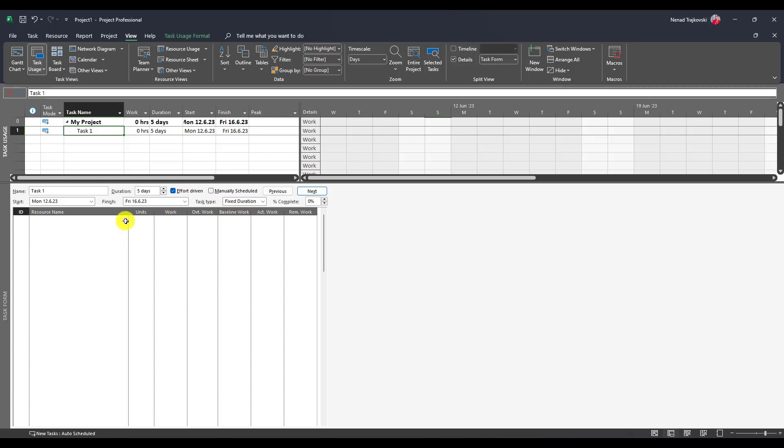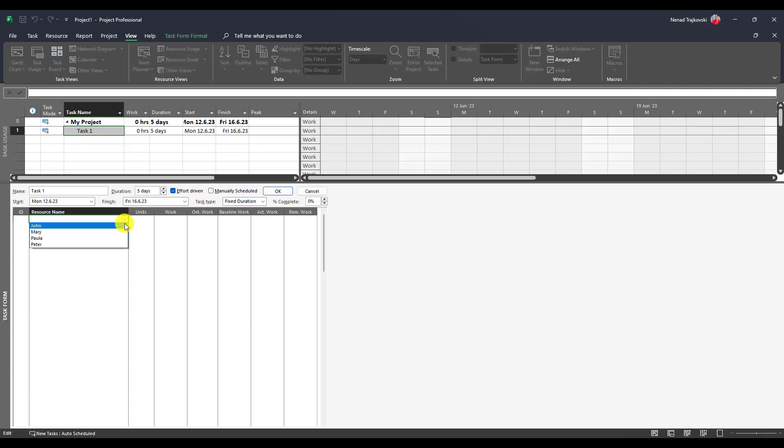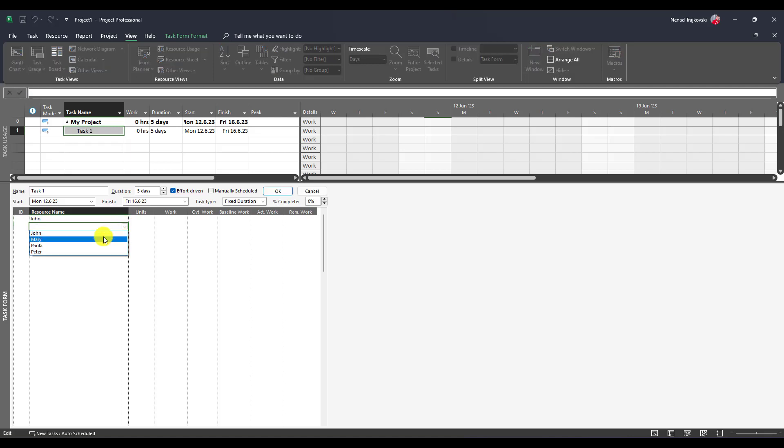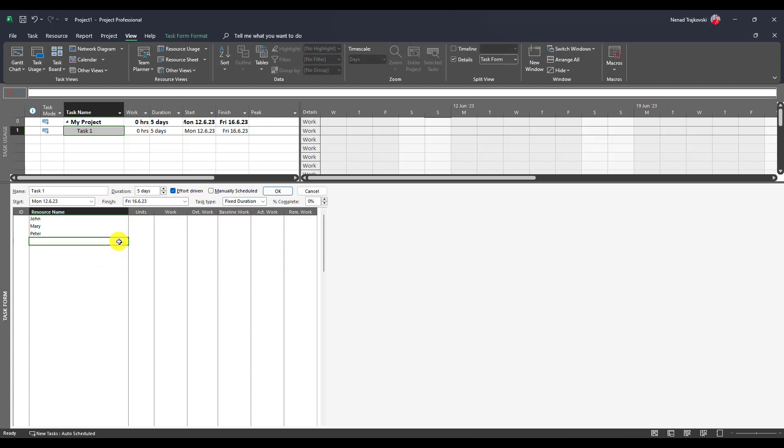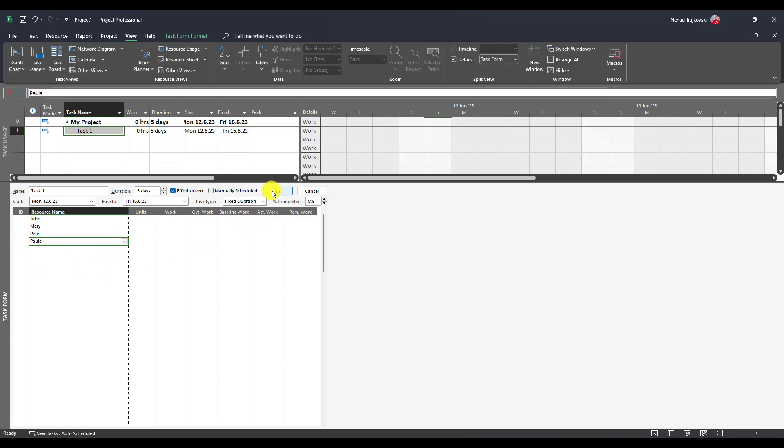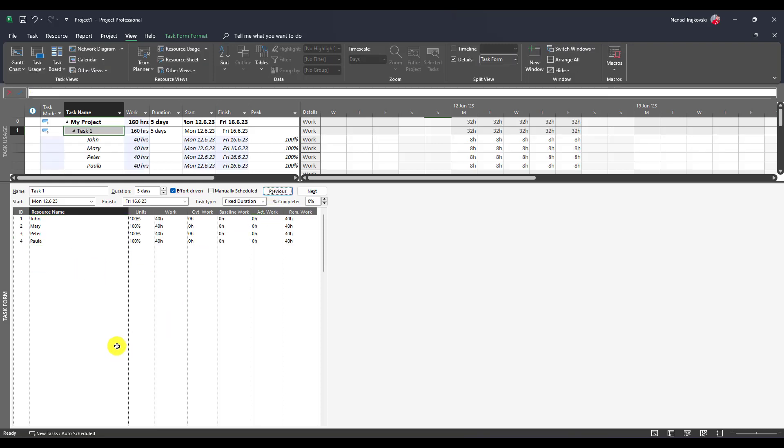First of all, I will add all resources at once: John, Mary, Peter, and last but not least, Paula. I'll click OK. You'll see all of them are going to work 100% and 40 hours—five days multiplied by eight hours per day multiplied by 100%.